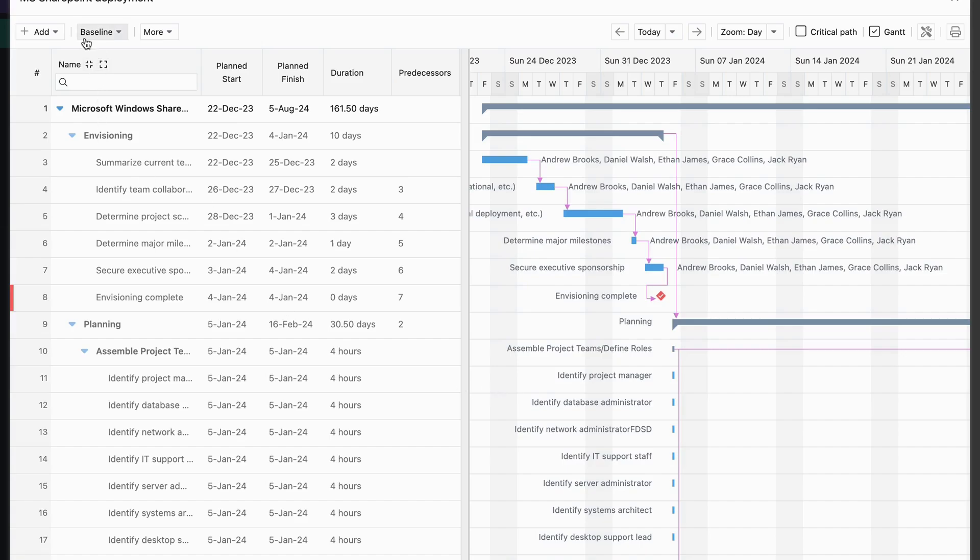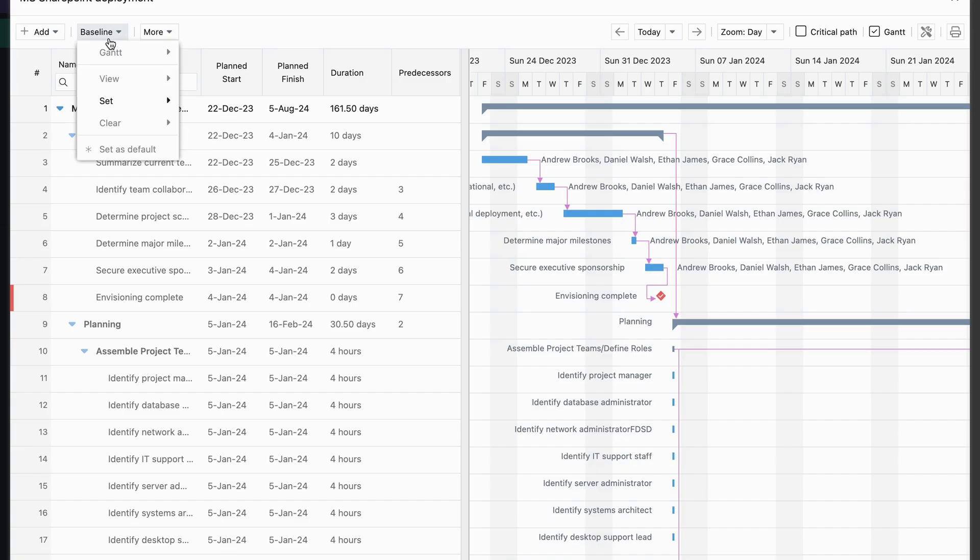First, open your Gantt chart. At the top, you'll see the Baseline option. Click on it to create a baseline, then click Set. You can choose to baseline your entire project or just specific tasks.